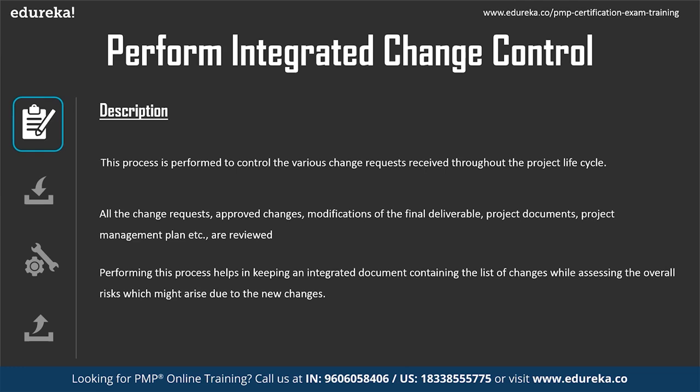There is something called the 7 R's of change, which we discuss while doing service management. That is: who raised the change, what is the reason for the change, what is the return from the change, risks of change, responsibilities of change. Likewise, we define 7 R's. There should be an answer to those 7 R's. So this process is performed to control the various change requests received throughout the project lifecycle.